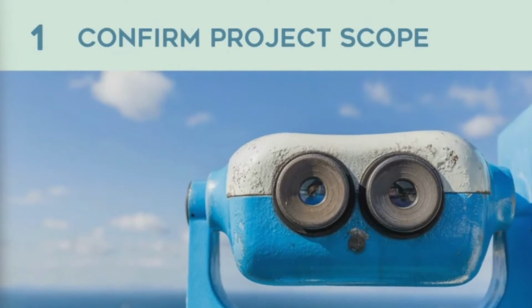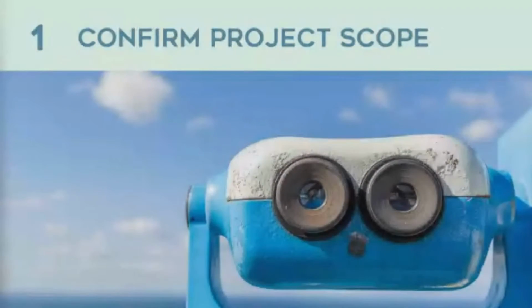So I recommend that your first step is to confirm your understanding of the project scope or overall purpose for the project's initiators. What this means practically is that we have a conversation with leadership or whoever has initiated the project to make sure we completely understand the project's purpose. In mission-driven organizations, projects may start with a funding or grant proposal, and there may be significant time between when that proposal was written and when the project actually starts.